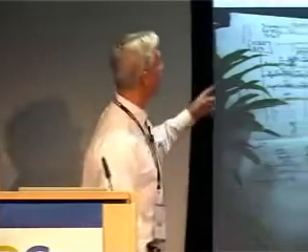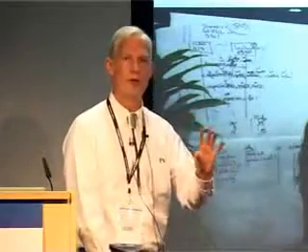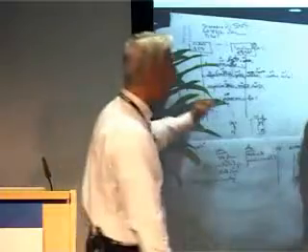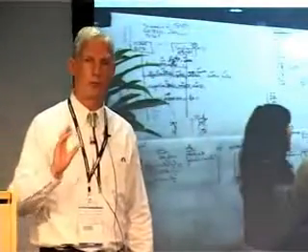Another requirements-related tip is that typically in offshore, the group doesn't know the domain well, and you need to consciously focus on the knowledge transfer problem. So what I recommend starting an offshore project with is a vision workshop and a domain workshop, and these are slightly different things. The domain workshop is simply answering the question with the team, what is the domain of financial trading or network telecom systems or whatever, and spend a day in a room with the team doing domain models on the walls, just doing Q&A so that they understand the domain vocabulary and concepts. And then in addition, have a vision workshop with the team so that they really grasp the overall vision for the release of the project.